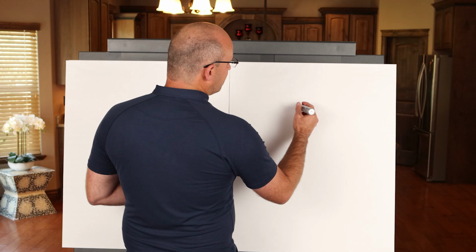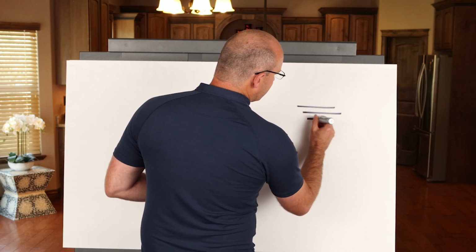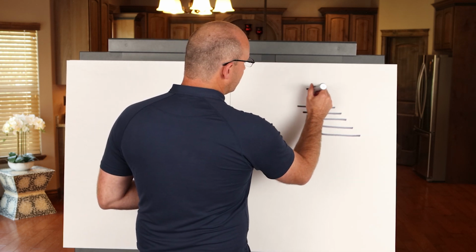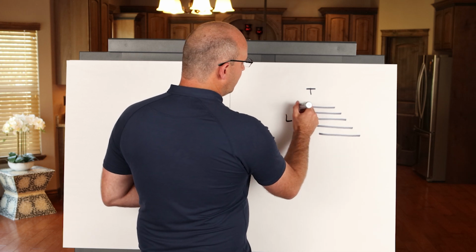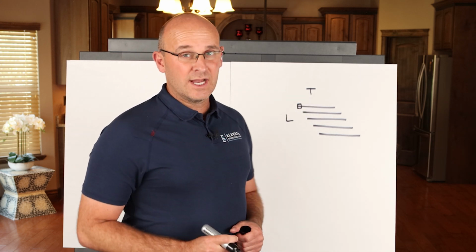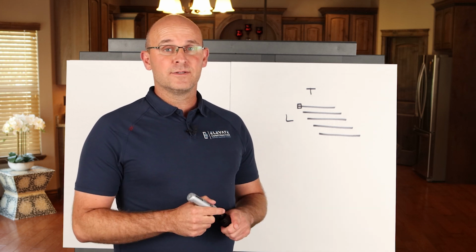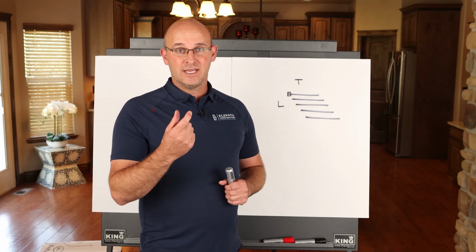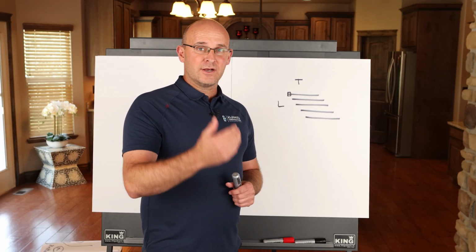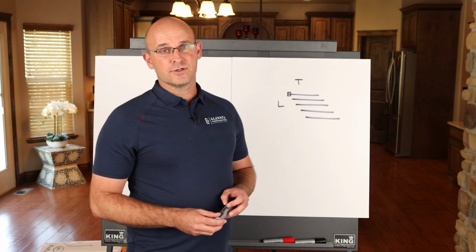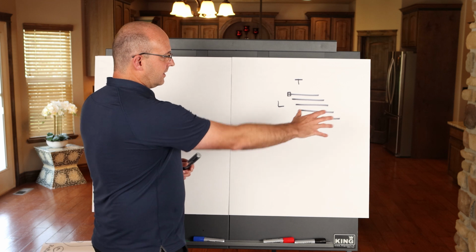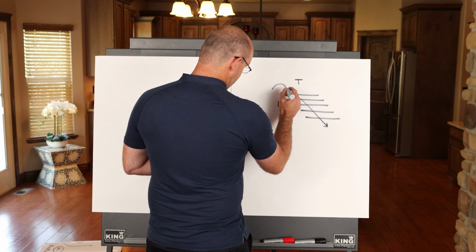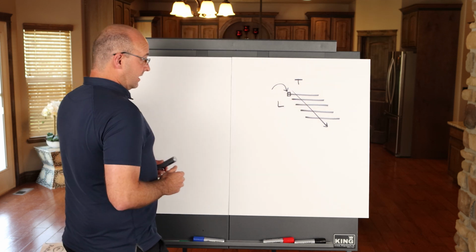So we've talked about in previous videos how your overall production plan on the construction project should be the start. Each one of these sequences in a time by location format or a tacked format will have individual tacked wagons. Those tacked wagons will have work packages. Work packages are the individual packages of work that the trades will install on a daily basis in one-day durations that should be prepared, pre-kitted, and ready to go when the trade partners show up. So we don't design and then figure out how to build the design. We figure out our production plan and our rhythm and what our work packages are, and then we work back and design to it. So that's key.